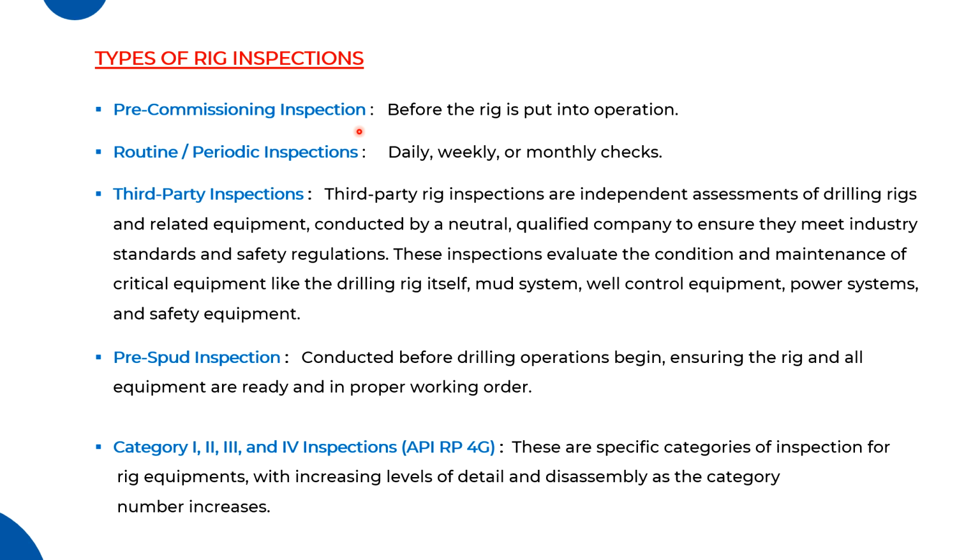And what is the commissioning test for? During this inspection, the rig is checked to ensure that all the equipment of the rig is functioning well and is as per the specification defined or requested by the client. Okay, so this is about the rig commissioning. What I said is that all the equipment of the rig is functioning well, and it is designed and functioning as per the client specification. So when we are ensuring this, it means this is a pre-commissioning of the rig.